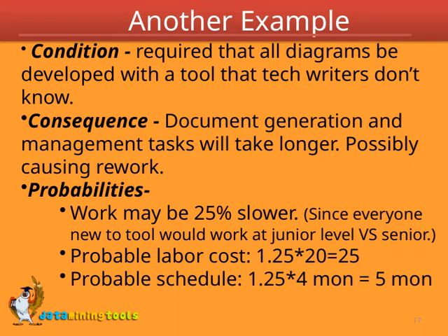On this slide, we're looking at a specific condition that impacts our documentation process. Essentially, it requires that all diagrams be developed using a particular tool that our technical writers aren't familiar with. This creates a notable challenge because the team doesn't have experience with this tool, which can slow things down.